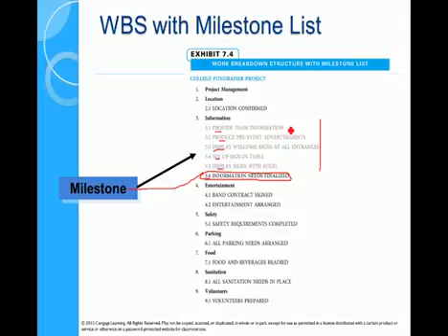Okay, you can actually further aggregate this. For example, provide team information might include activity 1, which is write the information, and activity 2 is maybe email the information. So there might be a number of activities for one work package. A schedule and a WBS don't have to be one-to-one. That's what I'm saying. But at this early stage in your career, making them one-to-one is probably a good idea. So each one of these is an activity.